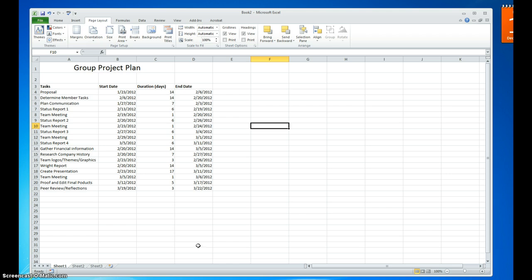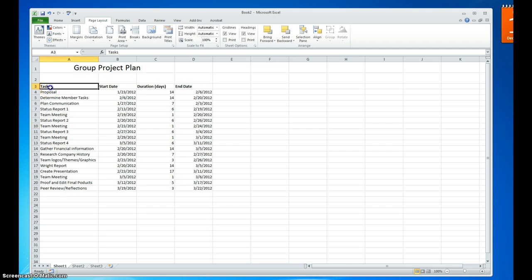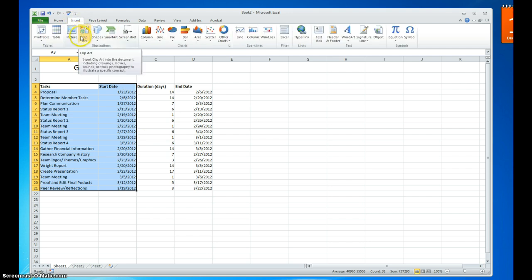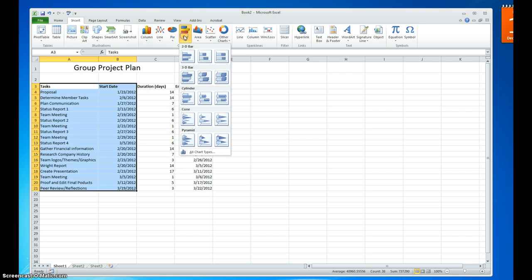Now we're going to create a bar chart from this information — this is going to be the basis for our Gantt chart. We're going to select the tasks, titles, and the start date. Then we go up to the Insert tab, go over to Charts, select bar chart, and we're looking for a stacked bar chart. We're going to have two layers on our bar chart to begin with, so we'll use the two-dimensional stacked option.